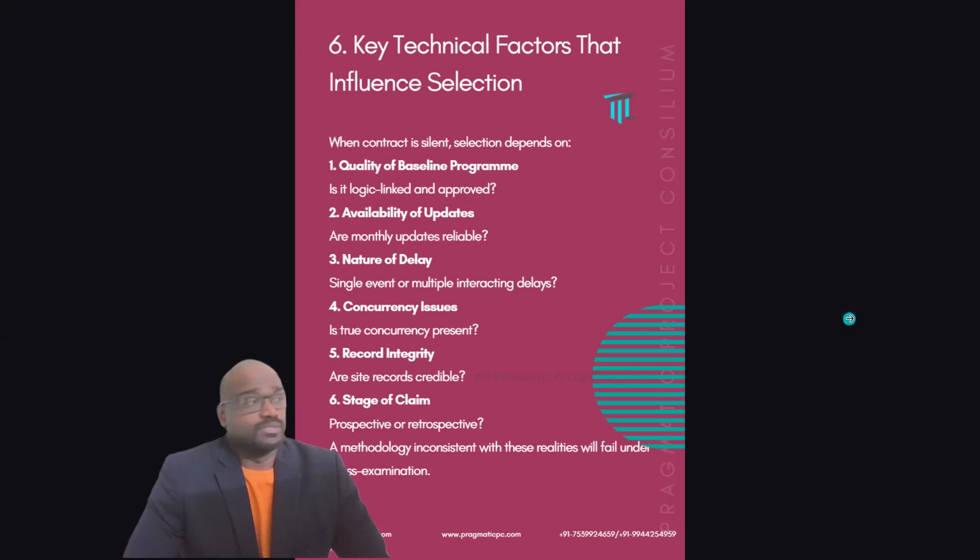Quality of the baseline program is very important. Whether it is logic linked and it has the capacity to perform an analysis, because prospective analyses are mostly software driven. So if the baseline's logics are not properly linked, and you try to insert the delays, the software may go crazy if you don't have a properly logic-linked baseline.